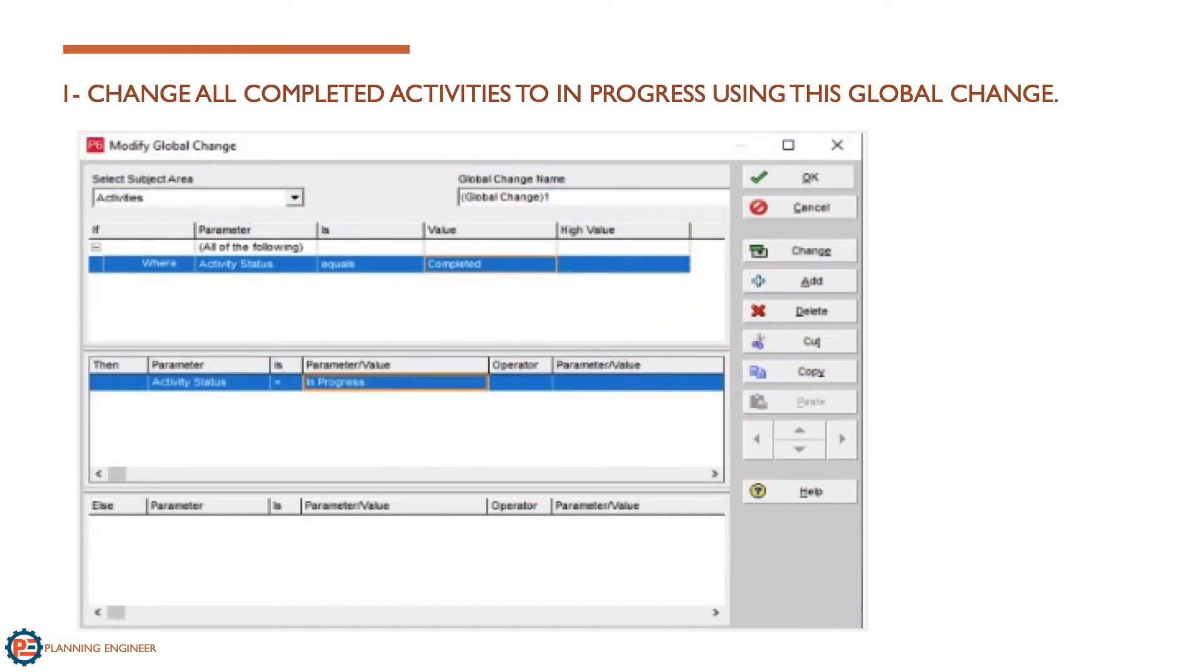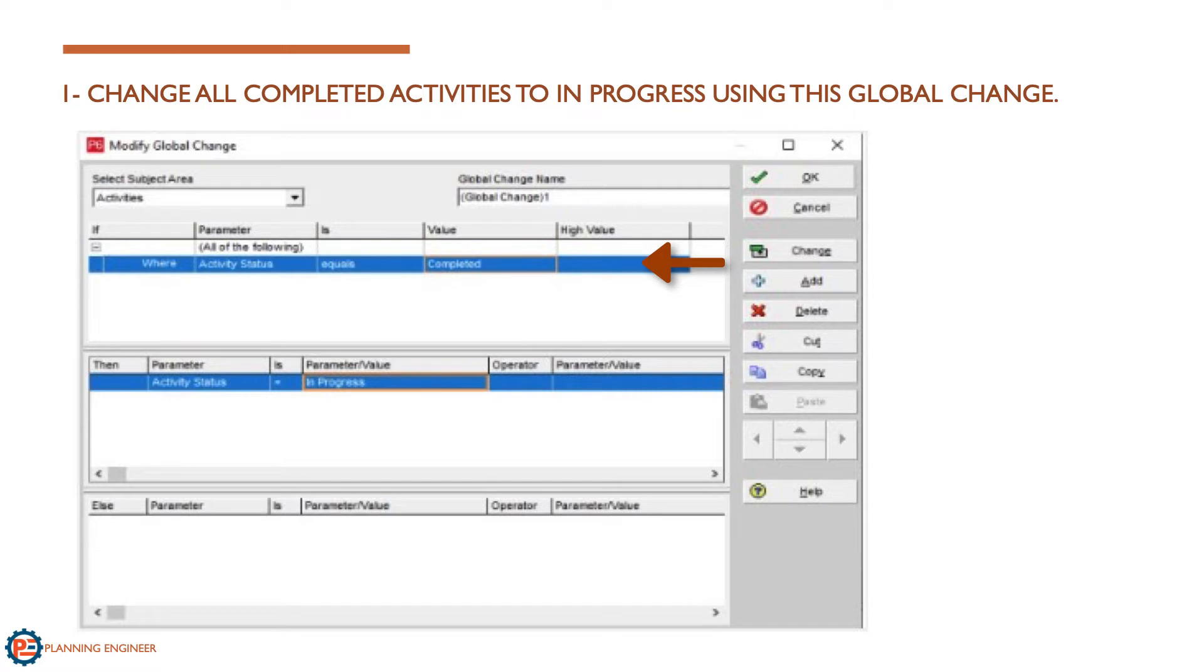The first step is to change the completed activities to in progress. We need to do this to be able to remove the actuals. We cannot remove the actual percentage without doing this step. We can do it by selecting completed activities and changing their status to in progress.